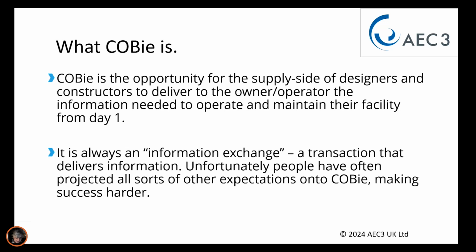The point of COBie is that it's an opportunity. It's an opportunity for the supply side, designers, and in particular constructors, to deliver to the owner operator of the facility the information they need to operate it from day one, to operate and maintain their facility. And in one case, I remember working with the US Army, and we were specifically asked to ensure that they could have the information, the handover information, 3 months before they got the actual physical facility, so that their team could practice operating the facility.